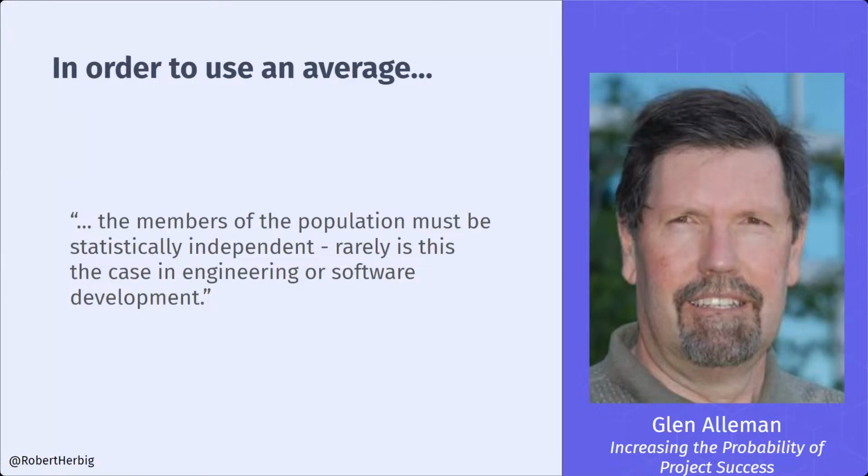Generally, a series of stories, and you may have them labeled under a feature or an epic, depending on your process, are going to be in related areas of the code. And so if we find a landmine in the code or something that doesn't work like the way we thought it would, it affects multiple stories. Or we may find that a feature needs to change. In this case, I mean feature to be a user increment of work. And so it has those related stories. And so averaging really doesn't work because of that.